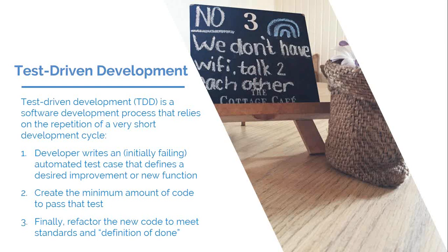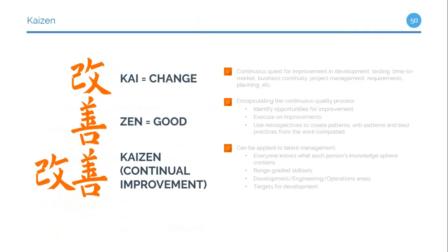If we're prototyping, if we're just trying to get something in front of the business, I want to reduce the amount of time every single task is taking. Say I gave it an 8-hour estimate and I finished the test and the code for the test-driven design satisfaction in 2 hours. I may allow people to exceed the quality based on the timing, or if we're running behind, going yellow, going red, I would like to take that extra 6 hours and use it to catch up.